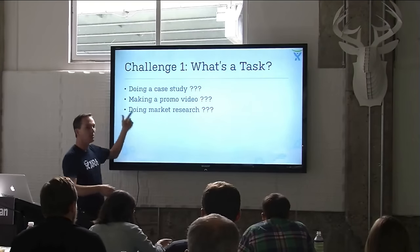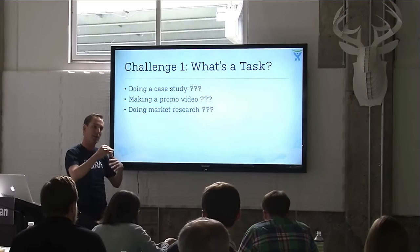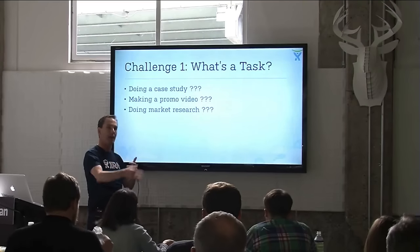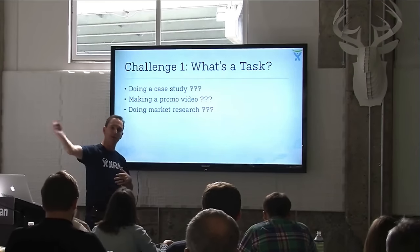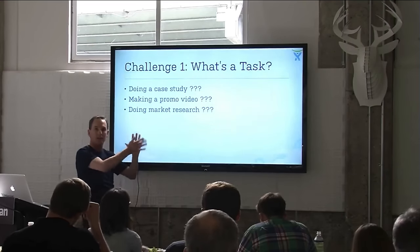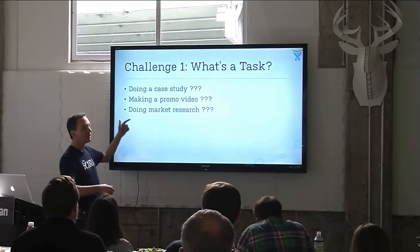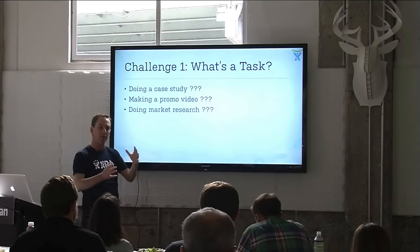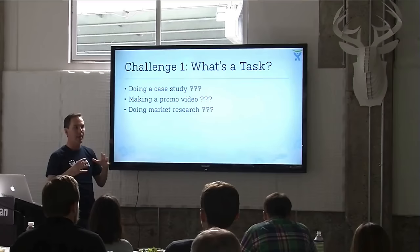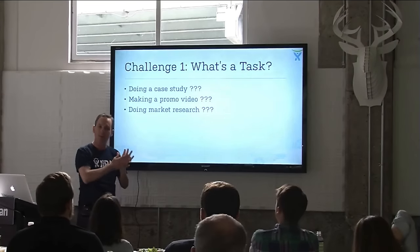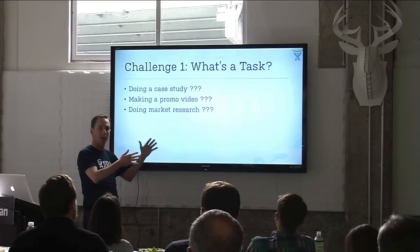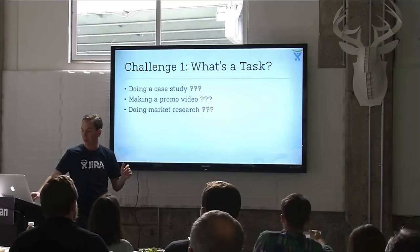That's a task that sits in progress for a really long period of time, and that's bad. Making a promo video is another example — you do the script, get the customer signed up, wait for the video crew who won't be here for two and a half weeks. Again, that task sits open. Market research too — you do specs first and then wait. Anytime you're waiting, that's a sign you're talking about a collection of work, not just a single task.